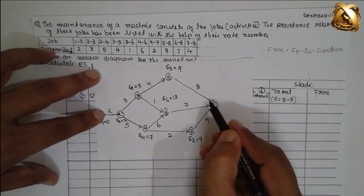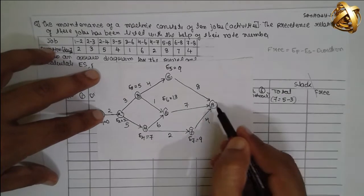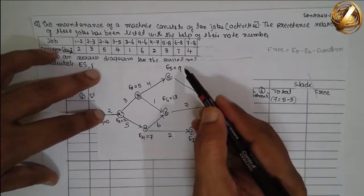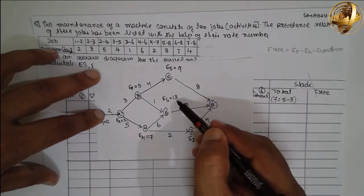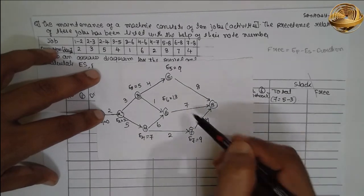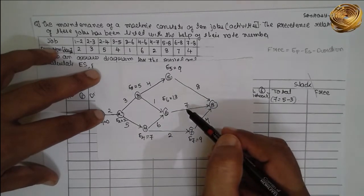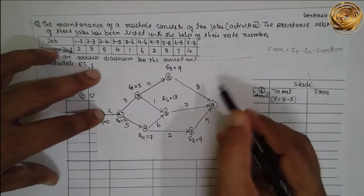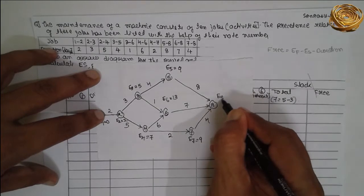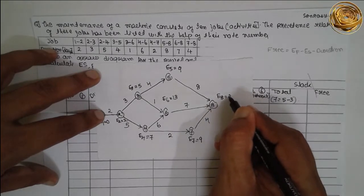At this junction we also select the larger value. We have 9, 13, and 9 — we select 13. Thirteen plus 7: E8 is equal to 20.